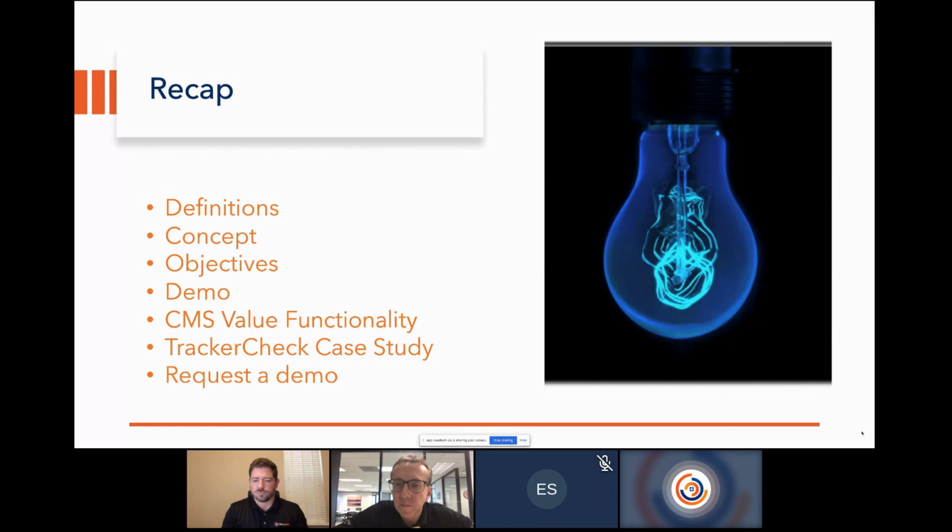And it breaks the procedures down to a step level. You can capture signatures and sign-offs and dates at a step level and then roll that up to an overall % complete by section in the procedure and then an overall for that procedure.